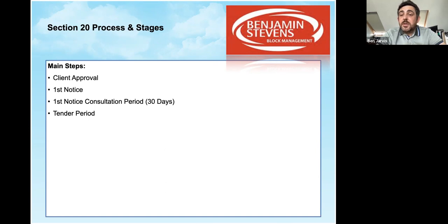It doesn't need to continue, and that you're going to, on instruction from the client, place an order with the successful contractor. So I think it is best to always try to hold off getting any kind of tender or quote until the end of the 30-day consultation period.